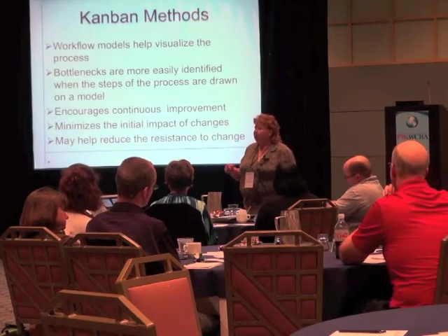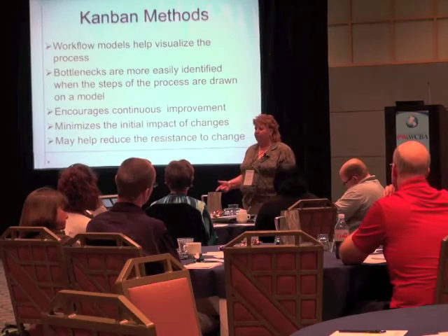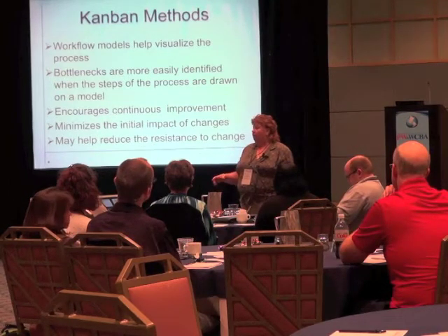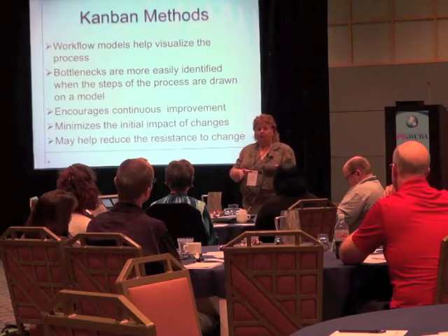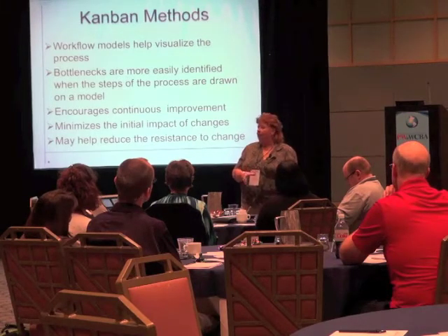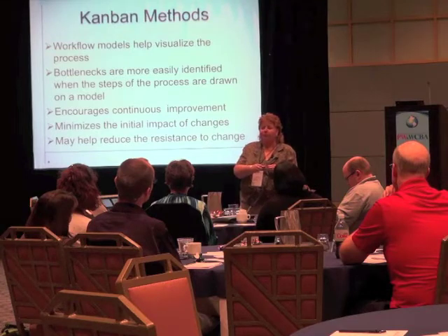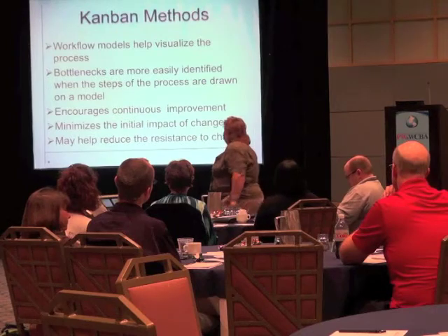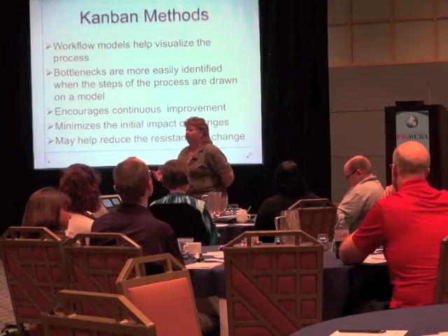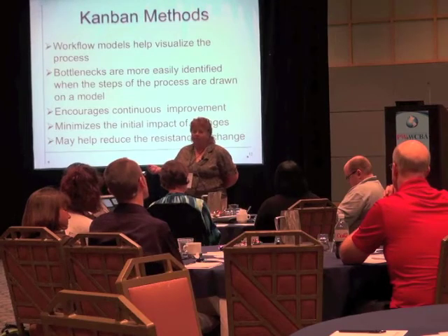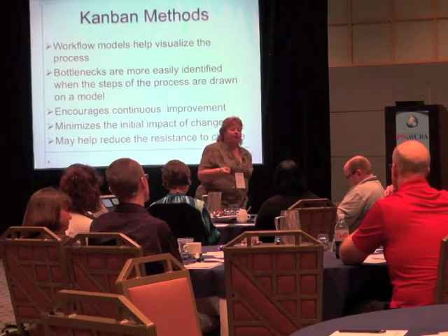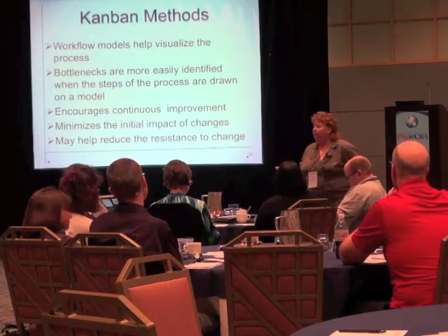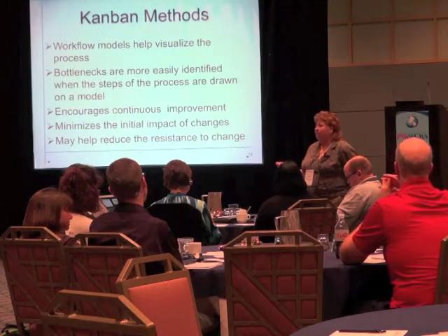So if you were moving towards Agile and someone says you have to do your retrospectives with your sprint cycle every 2 weeks, I would have to agree that if you're doing Scrum, yes, that's when you're supposed to do it, but I'd also say vary what happens in that retrospective. You can have small retrospectives sometimes and then have a big one every now and again if that's really what helps your organization. The other part I found about it is that because this was a simple technique applied to the process these guys were naturally doing, their resistance to change was very low. And it showed them places where what they were doing probably wasn't the optimal thing.